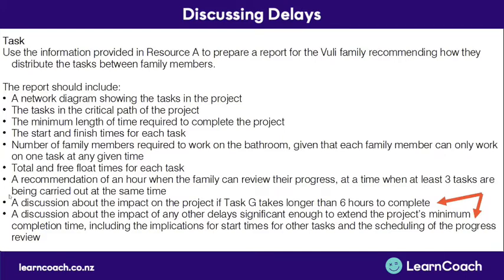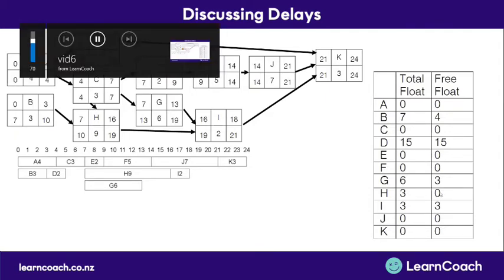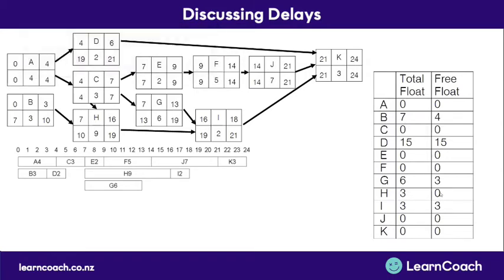We'll start with task G as an example. Total float is the maximum amount of time a task's completion can be delayed without affecting the project's minimum completion time. If we exceed that, we extend the project's completion time and create a new critical task. Letting task G take 13 hours instead of six — delayed by seven hours, exceeding the total float — the path A, C, G, I, K totals 4+3+13+2+3 = 25 hours, which is longer than the project's minimum completion time of 24 hours, making that the new critical path.